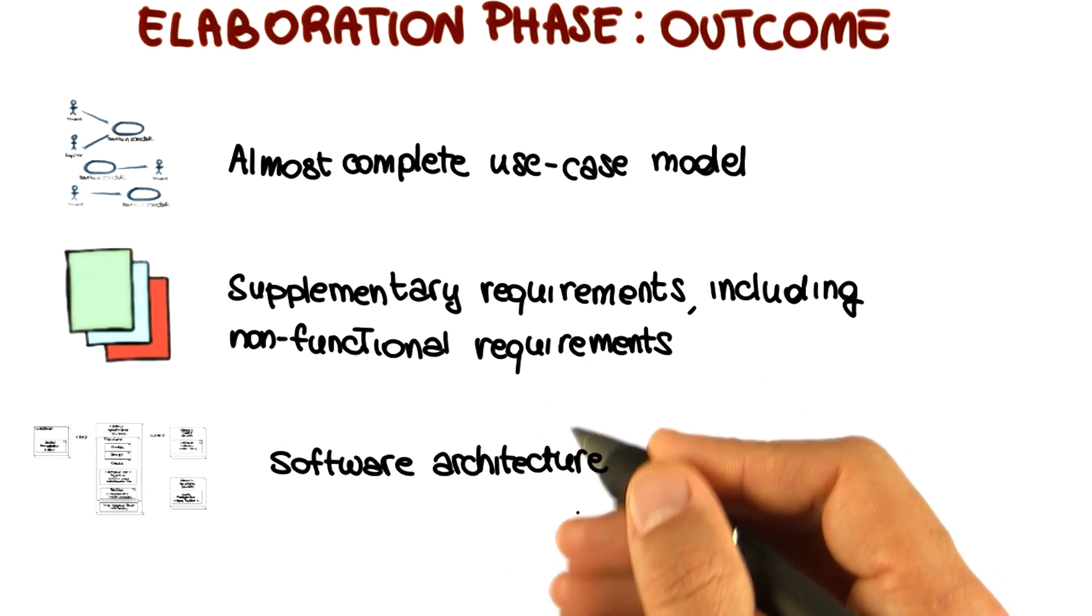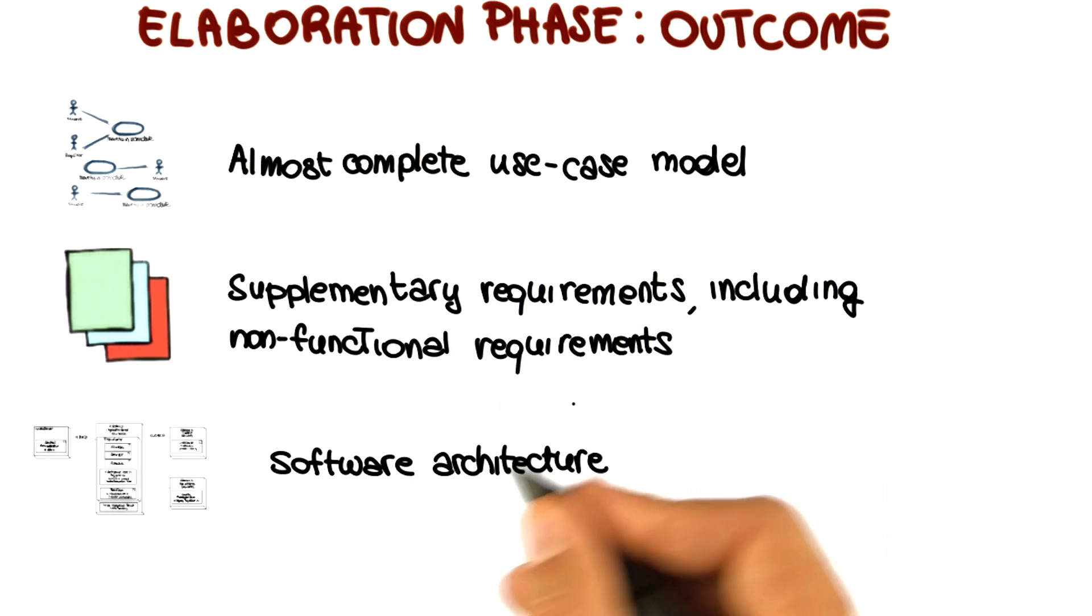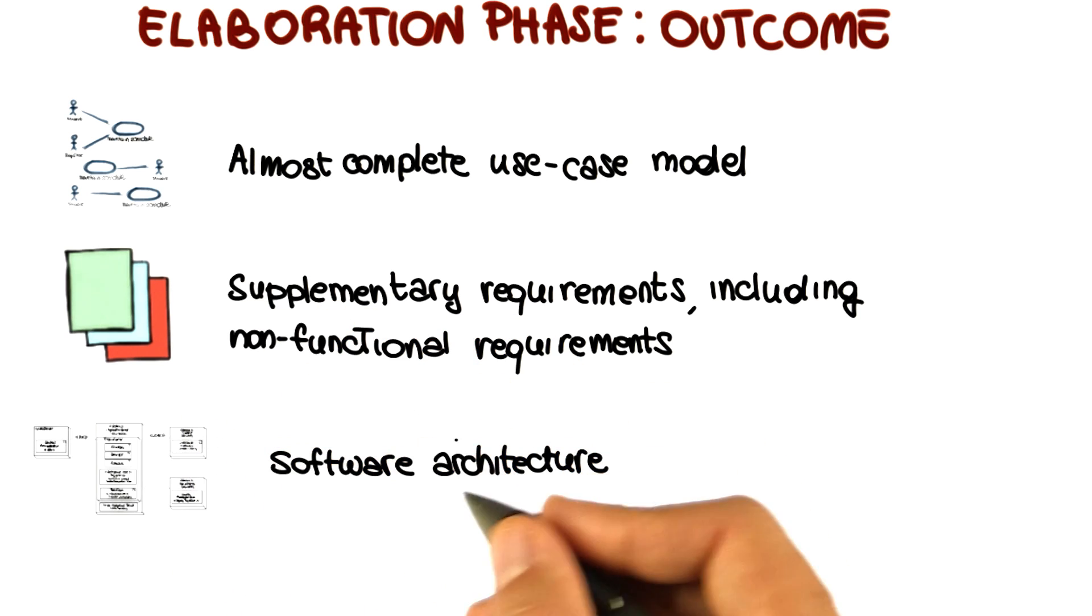We mentioned before that the software architecture is developed in an incremental way. It's not created at once. This is exactly what happens in the elaboration phase: we take the initial architecture that was defined in the inception phase and refine it until we get to a software architecture which is complete, and that is part of the deliverables for this phase.